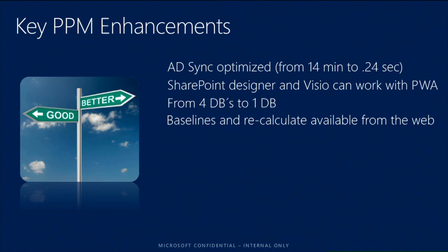Baselines and recalculate is available from the web. This is because there's a new service involved in the Project Server architectural layer, meaning that when you make changes within the project client, you will see the results right away. Previously, if you used the project web part called schedule and did your plans from the project web app, you had to click the recalculate button in order for your changes to have an impact. Now, what you're doing will simultaneously show you the results, just as if you were in the client. So that's a strong one.